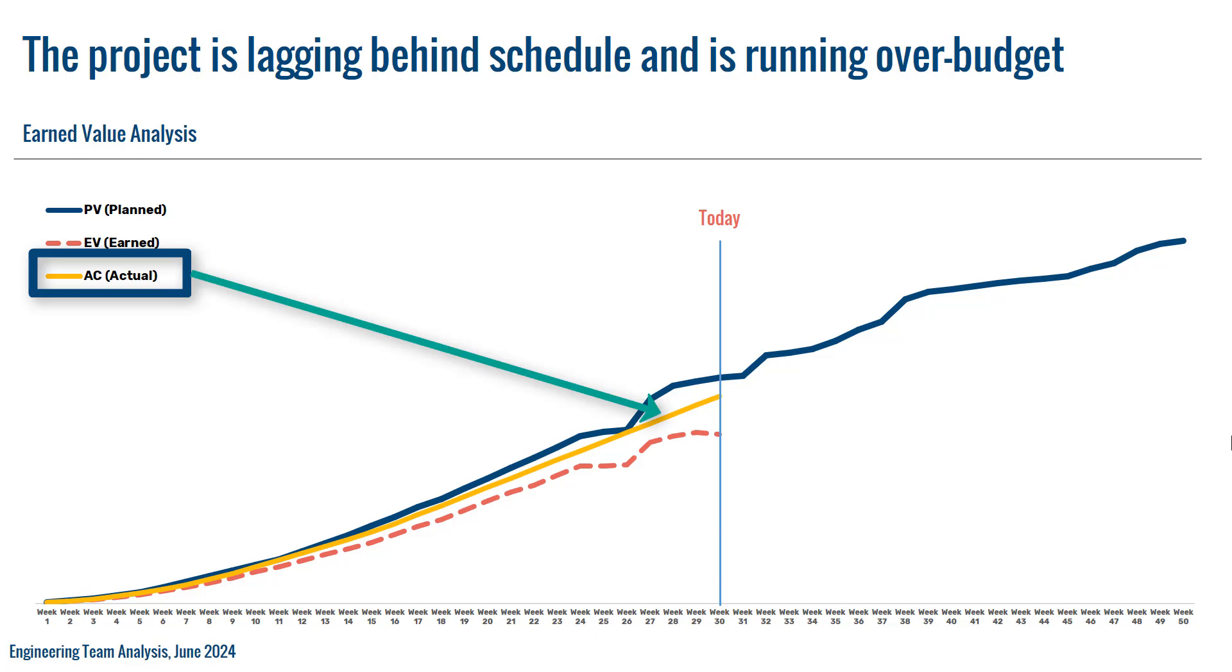And last but not least, we have the Actual Cost. Actual cost is also known as actual cost of work performed. It is the total cost incurred for the work performed up to a specific point in time. It includes all costs, whether direct or indirect, incurred during the execution of a project.